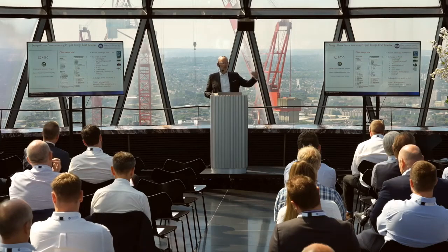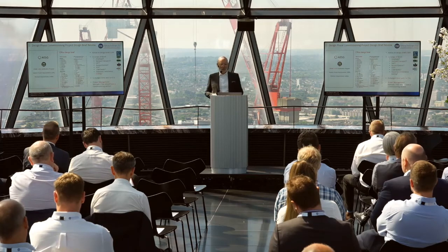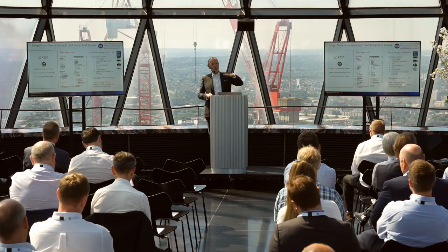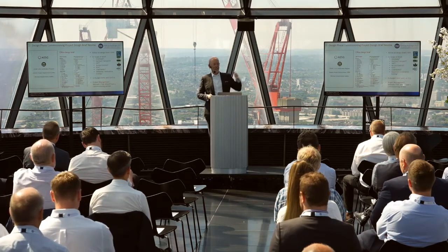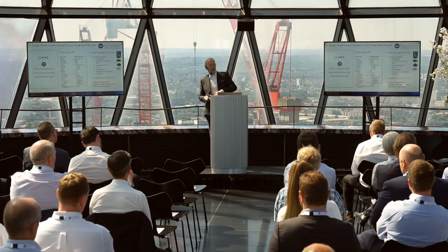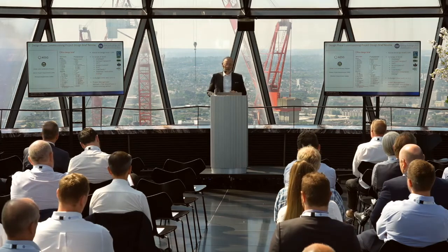And a design brief includes things like service life, facade. A building is a system of systems, and the facade is probably the most important system. So what should the facade life be? What should the performance be? How does it interact with the systems? But also specifying the scope of work. If you want building envelope commissioning, you should be asking for it. It needs to be costed and accounted for all the way through. So getting that scope of work early is really important.